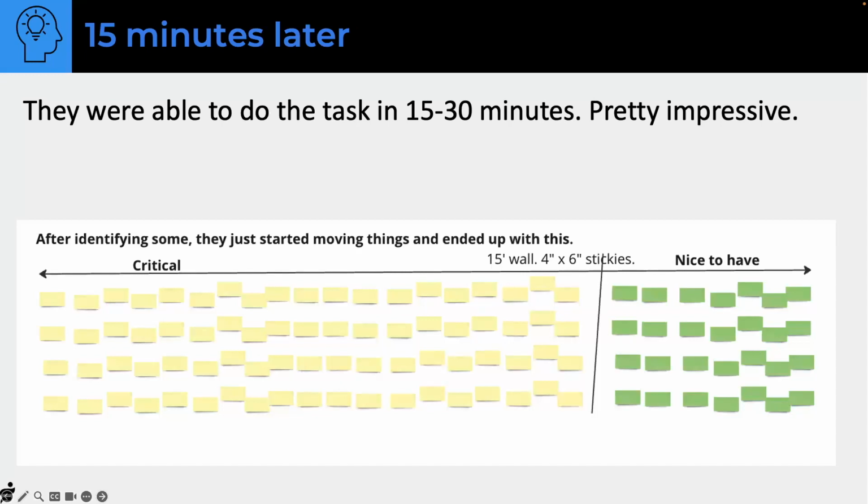One project is, I asked them, how long would it take, if your estimate's right? They said about 7 months. So now we had a 7-month project and a 3-month project. I call this Pareto versus Parkinson's, because, well, it's not 80-20, but you get it. This is what I need, and it's a subset. And I'm putting the line on the board saying we're going to do this in 7 months because otherwise Parkinson's will kill us. So we have a new project called 7 months, all the stuff that we need.